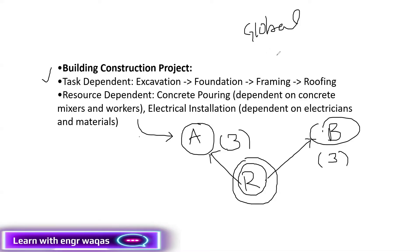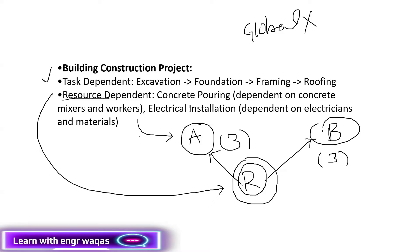But when it comes to resource dependent activities, Primavera P6 is not going to consider the global calendar. Primavera P6 is going to consider the resource calendar — that resource which is deployed on that certain activity. So Primavera P6 is going to consider the week of three days.